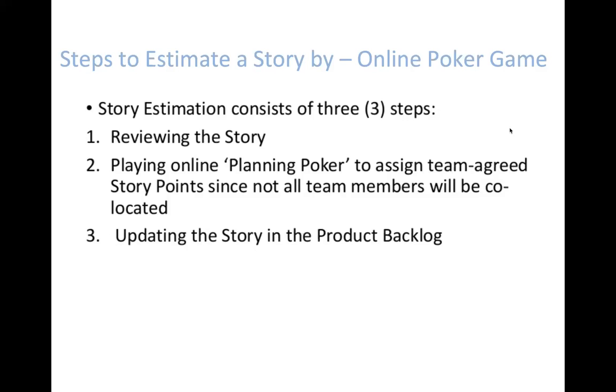Sometimes the team members provide different numbers. Some team members give 1 unit, some give 3 units, some ask for 4 units. When the team provides different numbers, they have to discuss with each other and understand why some members gave lower numbers and why others provided bigger numbers.